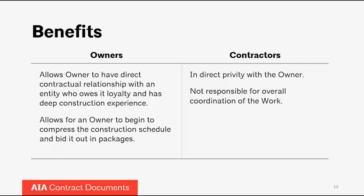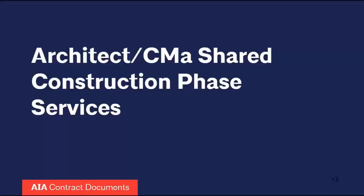When we take into account the multi-prime elements of such a delivery model, this allows the owner to compress the construction schedule and bid out work in packages. It is conceivable that the owner might actually bid out and start site work even before certain elements of the final design are completed — the same applies to foundations, structural steel, and so forth. This allows for a phased approach and early start. In a multi-prime situation, no one contractor has responsibility for overall coordination of work — that responsibility falls to the CM as advisor.